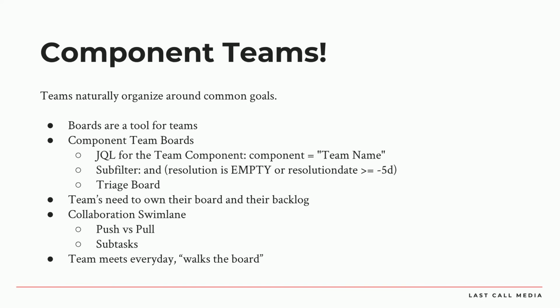A pull workflow, on the other hand, would be the issues are placed in an area where everybody knows to look for what's next, and the whole thing is set up so that they know where to look, and they're able to ask questions, and make suggestions and maybe break the issue down further. But really the point of the whole thing is that they pull the issue to themselves. And they say, this makes sense, I can do this, and I can probably do this by today or the end of the week or whatever. But either way, they've committed, they have that personal commitment.